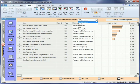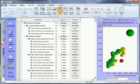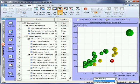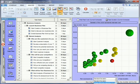The risk chart shows risks associated with tasks versus task duration or cost. The risk is expressed as the task standard deviation of task duration or cost, the maximum or minimum values and ranges, and percentiles.